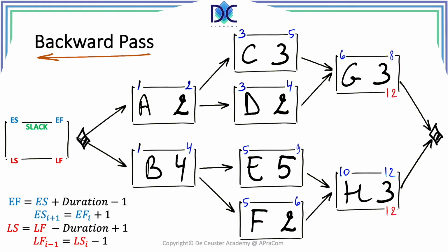In case you would make the mistake, there will be more than one path with the lowest slack. Hence, we could conclude that these would be the critical paths, but that would be directly in contradiction with the definition of the critical path, which is the longest path through the network.